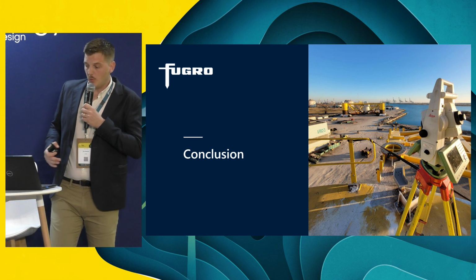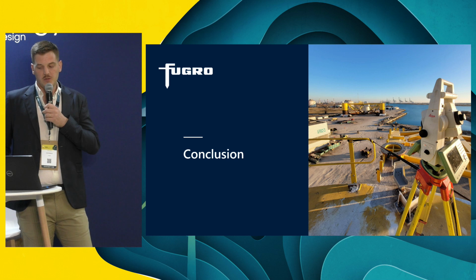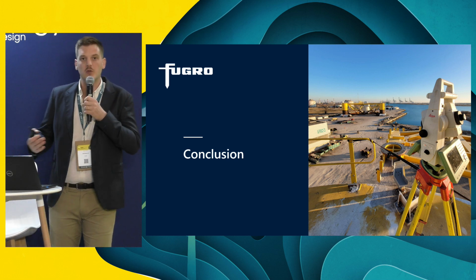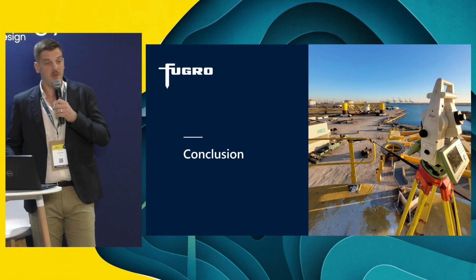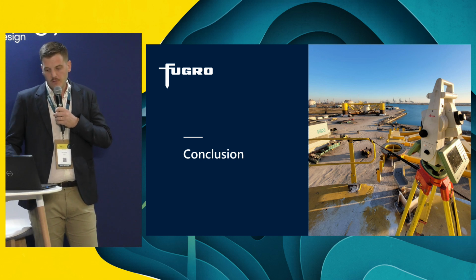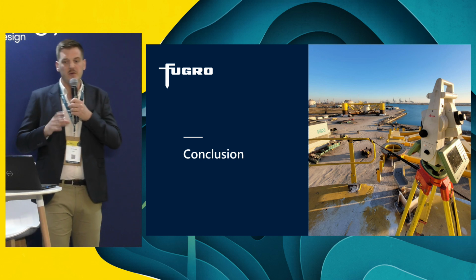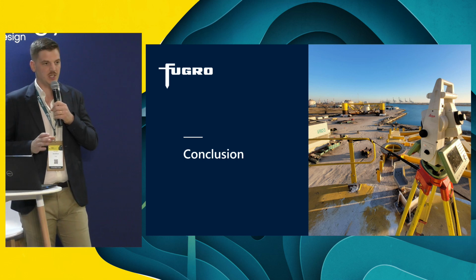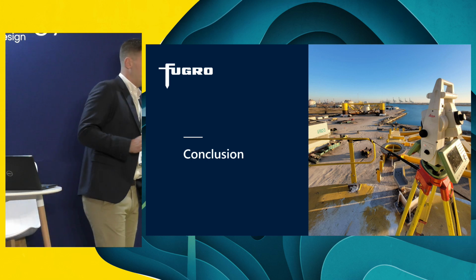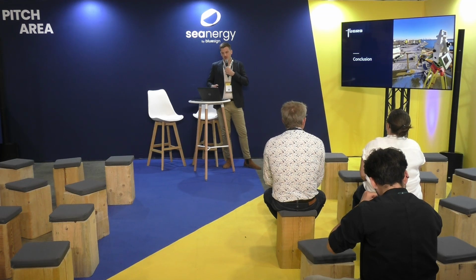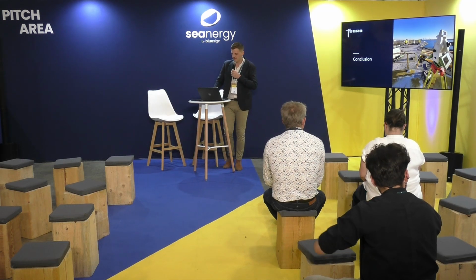Finally, to conclude, we can say that it's quite difficult to draw up a value proposition about dimensional control and to quantify its benefits when talking about money, because it really depends on the project. From a cost perspective, dimensional control is a very small percentage of the total project price. From our experience in offshore wind farms, it's between 0.1% and 0.3%, which looks ridiculous in comparison to the risk of having a standby day of offshore activity. However, it is true that this is a recurrent point in discussions with our clients.